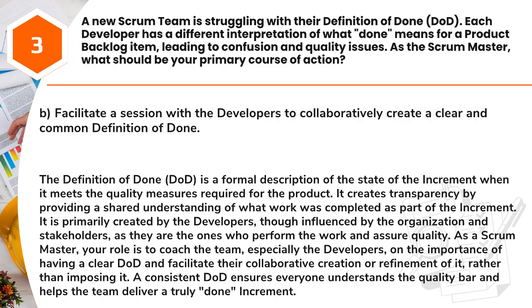B. Facilitate a session with the developers to collaboratively create a clear and common definition of done. The definition of done, DoD, is a formal description of the state of the increment when it meets the quality measures required for the product. It creates transparency by providing a shared understanding of what work was completed as part of the increment.